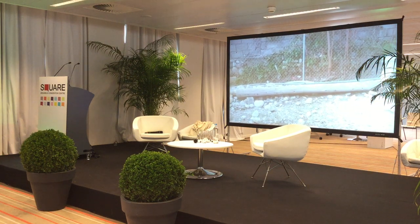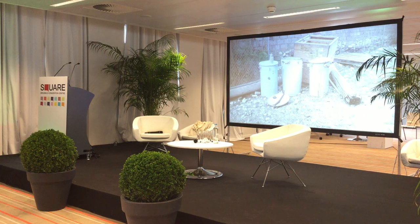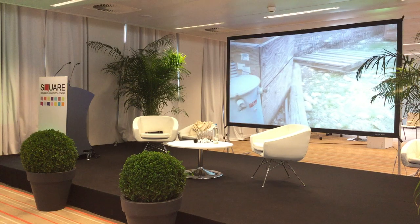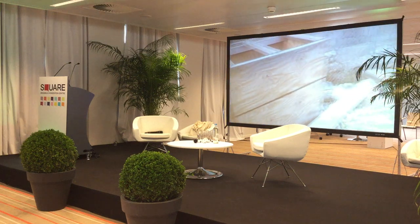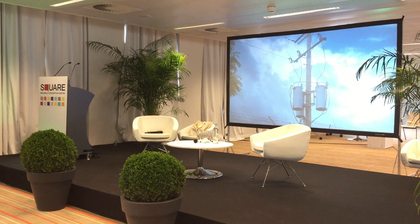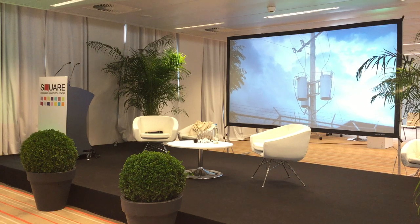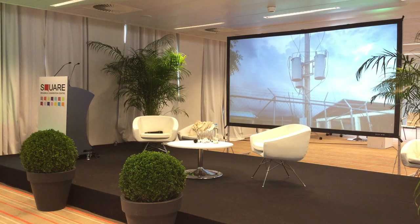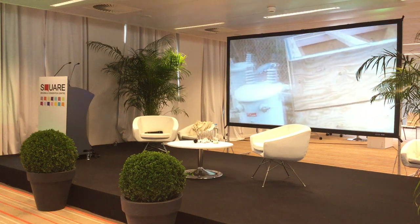2 years ago we were a victim of Hurricane Matthew, and we lost only one pole in town. But unfortunately, it was the step-up transformer pole. Here you can see the broken pole and the damaged transformers. And here you can see the new pole and new step-up transformers, which are now mid-pole. In the past, they were at the top of the pole. So we lowered them to make it more stable, hoping that they won't break for the next hurricane. This has been a lesson learned for us.